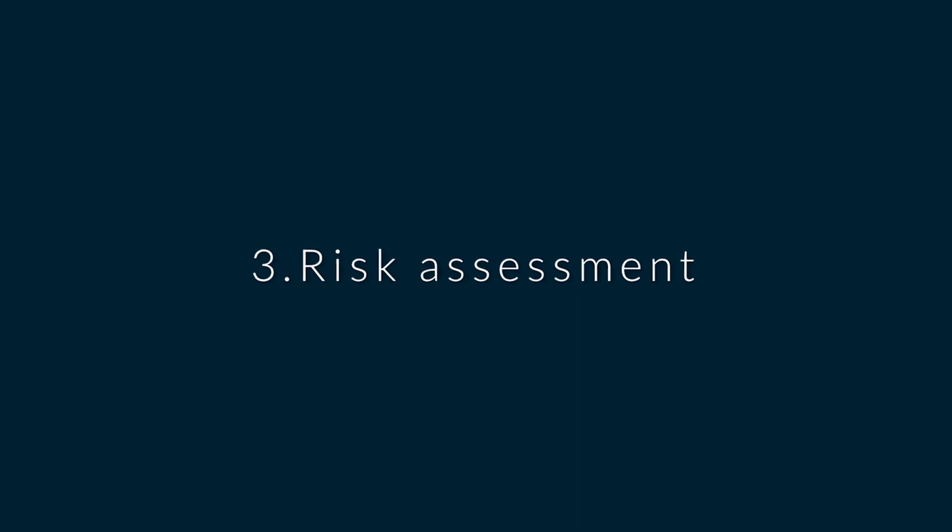Number 2, risk identification. And that means coming up, based on all that, with the risks you've identified. Maybe the suppliers are likely to go bankrupt. Maybe there is an issue with obsolescence in terms of the semiconductors you're using. Come up with all those risks. Next, risk assessment. At this point you know that. This is where you do your probability and impact, come up with the score and all that stuff.